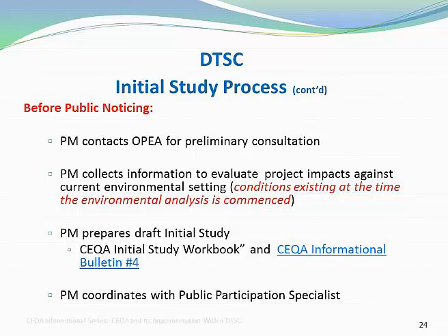The project manager prepares the draft initial study using the initial study workbook and informational bulletin number 4, and both of these documents are available on our SharePoint site. Concurrent with the draft initial study preparation, the project manager coordinates with the public participation specialist the project schedule, public notices, fact sheets, and community involvement activities. The project manager also shares the draft public notice and fact sheet with our office to ensure the proper CEQA process is described in each notice. The process, as I mentioned, is explained in our initial study workbook.